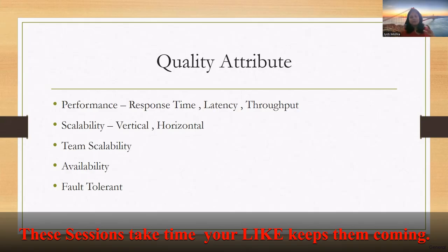We've come across a lot of times that people think, okay, if there is a time crunch, key deliverables, and developers are not available, will adding more developers solve our problem or cause more problems? It would cause more problems, right? Because there would be more handoffs, one has to review the changes, and there would be so many to develop and very few to review. Those are also things you have to take care of while talking about scalability.